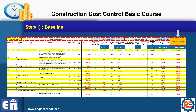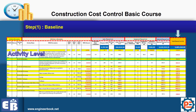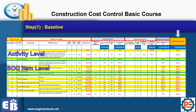This stage should ideally be prepared earlier by the tender department. However, if they didn't do it and you have the information, I will teach you in the next lessons how to develop such a simple yet effective template. We have two levels: the activity level, where we combine all relevant BOQ items under one heading, and the BOQ level. We will discuss all of these in the relevant lesson. This is simply the baseline.